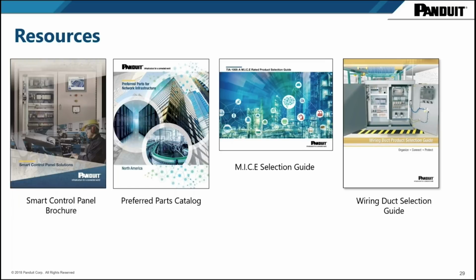Right. So I mentioned it just briefly in the commissioning slide where I was talking about the actual testing of the network itself. Typically, the cabling and connectivity on the plant floor, or what I refer to as the site cabling, is put in by a low voltage installation contractor. This could be an electrical contractor, but most likely it's going to be a low voltage contractor, or one that does both, that will install this type of cabling. Sometimes an end customer has a preference for who does that. It's typically that contractor who validates the system. So they'll usually validate layer 2 on that network for the end customer.